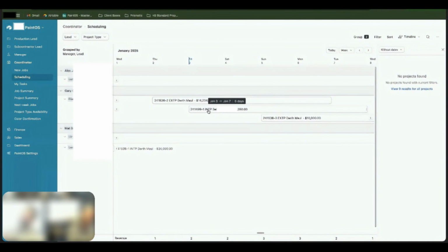It's basically just a math helper for Anissa or D to roughly get the right length on the first placement. That's all it does. And then you can place 6 projects on the same person because that capacity isn't a hard limiter. It's just each project that you place would be total hours divided by that person's capacity. And the next one, same thing, total hours of that project divided by their listed capacity. It's just applying that math to each placement of the job or the project.